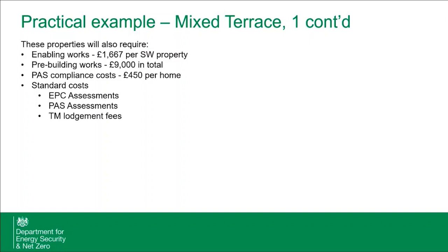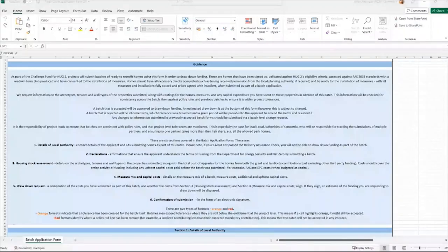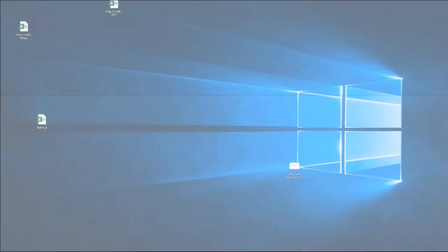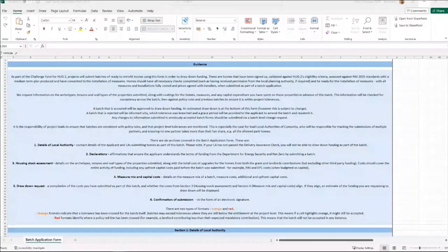But smart controls, I know, is a definite yes. Richard: Yeah, Monty, again, this is just something that's really important for us in terms of supplier spec. We've got to make a choice as to whether we include it in what we ask suppliers to do or not. And if there's going to be a change partway through the scheme, that's something that needs to be managed quite carefully in terms of introducing new measures, and potentially earlier householders who've gone through batches will be disadvantaged because that measure is not available when it's available later on in the scheme. So yeah, there's a lot of implications around this.